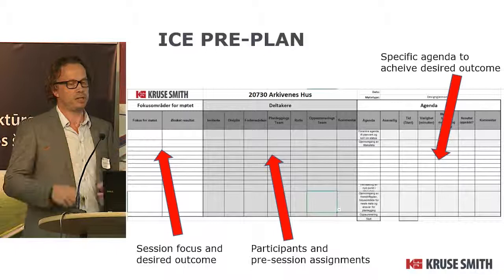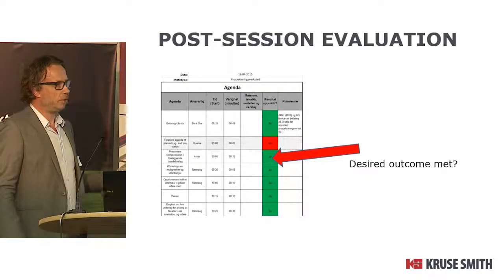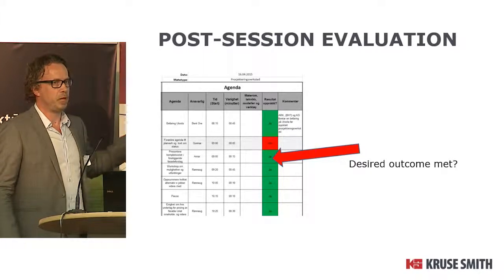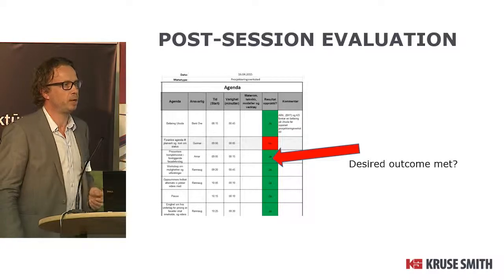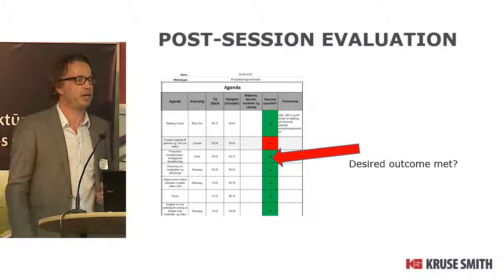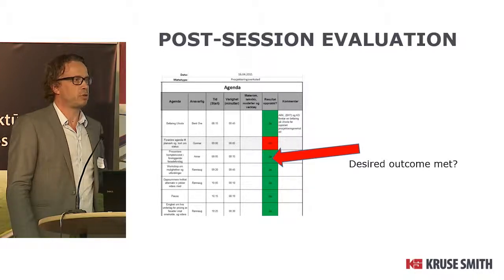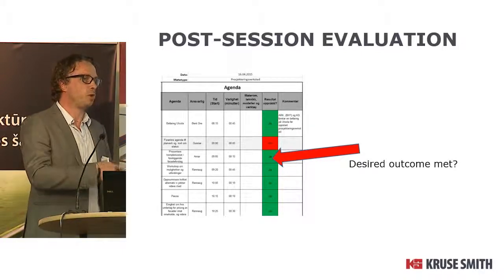It's actually very easy. After the session, we evaluate all the tasks on the agenda. Did we achieve it or did we not? Or just partly? And we use the colors that we've all seen in Lean and everywhere. Everybody can understand green, red, yellow. And if you don't achieve it, obviously you maybe bring it up next meeting, or assign it to someone to work on later.